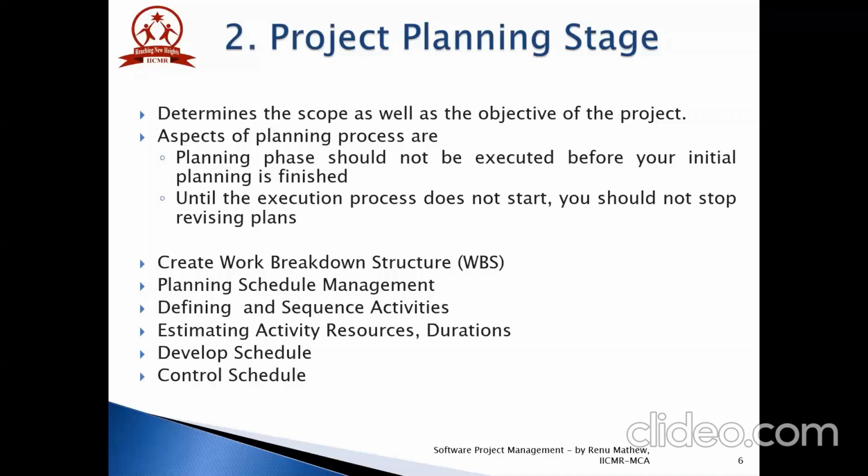It includes the process of estimating the work effort and resources required to complete the task. Availability of the resources should be considered while estimation, and the focus should be on the longest path of the plan, which is called the critical path. And the activities on the critical path will consume more time and money